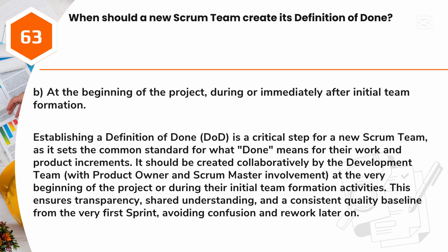It should be created collaboratively by the development team, with product owner and Scrum Master involvement, at the very beginning of the project or during their initial team formation activities. This ensures transparency, shared understanding, and a consistent quality baseline from the very first sprint, avoiding confusion and rework later on.